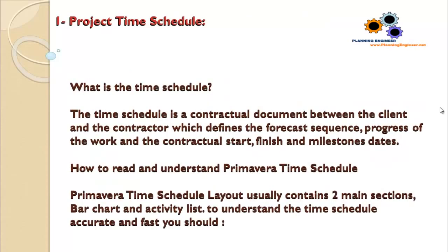The first document in our project management plan is the project time schedule. The project time schedule is a contractual document between the client and the contractor, which defines the forecast sequence and progress of the work, and the contractual start, finish, and milestone dates.